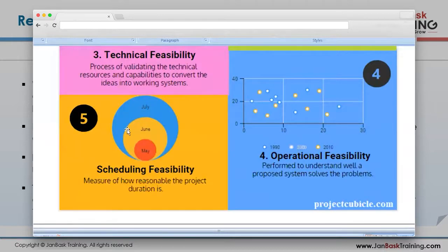Schedule feasibility. The client wants everything to be delivered by July. They are very competitive there in the market. They want all these deliverables in a short duration. Are we capable enough to do that? Do we have the bandwidth? Do we have the right skill sets? Or the right number of employees to get this done by July? Or can we do it in May, June, and July? We're going to have 3 deliveries and they are very strict about it. Whether we will be able to meet these scheduled timings, right?